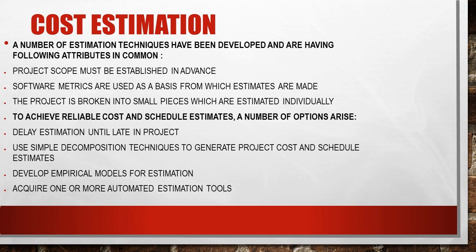This is a repeated point, but it is important, so I am repeating. Delay estimation until late in project. Use simple decomposition techniques to generate project cost and schedule estimates. Develop empirical models for estimation and acquire one or more automated estimation tools. So as part of identifying the cost estimation, we are going to develop empirical models for estimation.